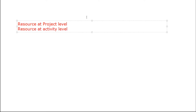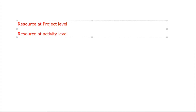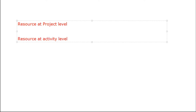Resources exist at two levels: resources at the project level and resources at the activity level. At the project level you see what is available enterprise-wide, and at the activity level you assign specific resources to individual activities.